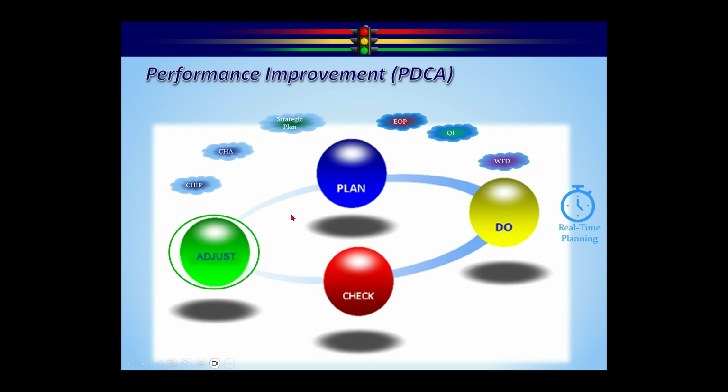Now, let's assume for a second that when we looked at that chart, that top right corner was only at 21%, not 25. Now we got to make a decision. The decision is the plan too high? Is it just really not possible to get to 25? If that's so, let's take our plan and adjust it down to 21%, continue through the cycle, try to keep it at 21. Maybe we say, no, the plan is okay. We can get there. We just need to have more resources.